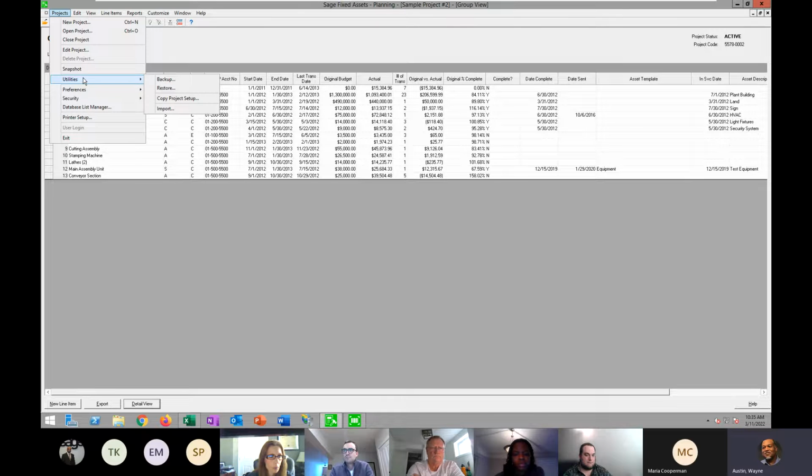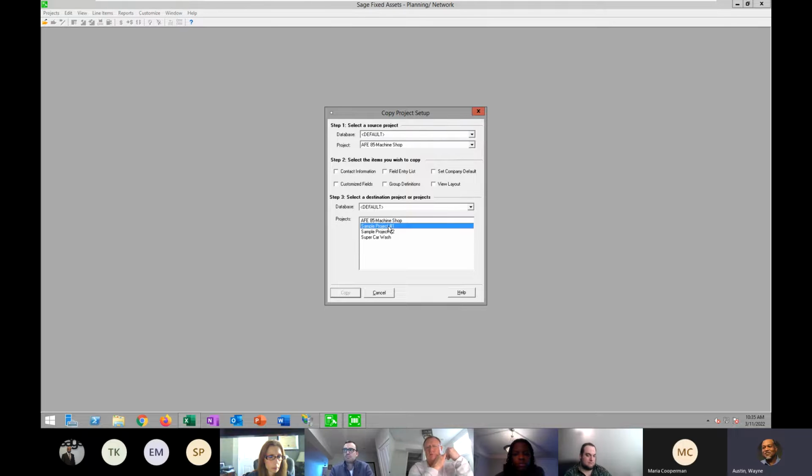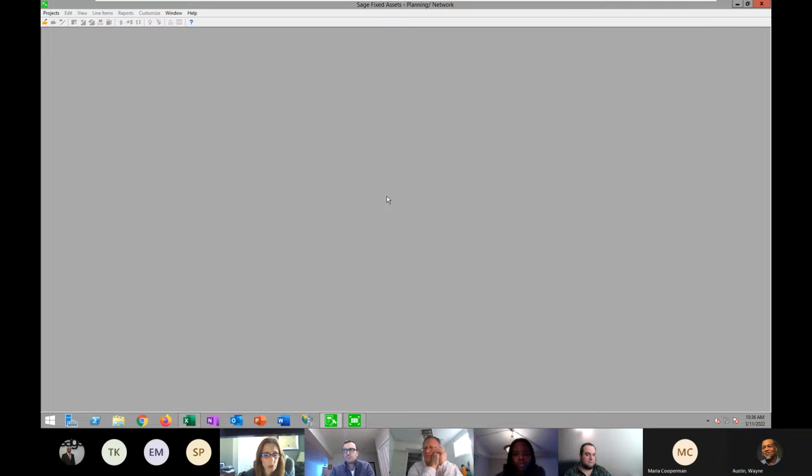And by the way, if I'm doing the same type of projects over and over, I can copy a project setup, so I don't have to rebuild each one from scratch, right? I can copy the project setup, including some of these customized fields and other things. So just to save Jared and his team time in getting things going. Yeah, that's so important. You can do all of those kind of things. You could set up template repeats for re-equips or new clubs or remodels or whatever. Because especially, you're going to be doing the same type of projects repeatedly, I would definitely use that function to copy those setups, because time is money, right?